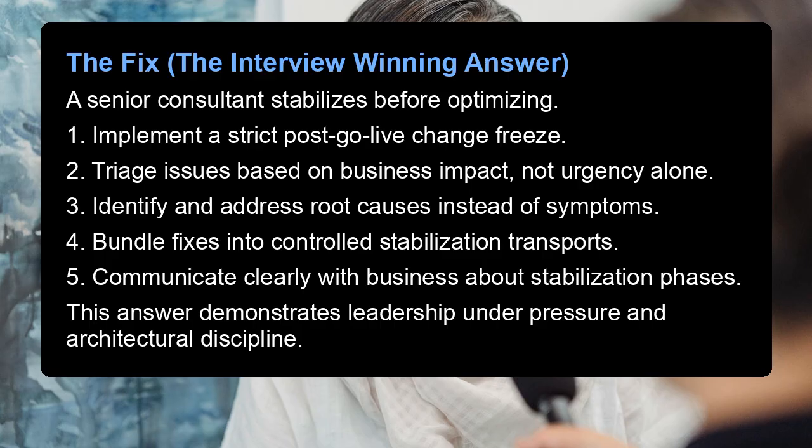The fix, the interview-winning answer. A senior consultant stabilizes before optimizing. 1. Implement a strict post-go-live change freeze. 2. Triage issues based on business impact, not urgency alone. 3. Identify and address root causes instead of symptoms. 4. Bundle fixes into controlled stabilization transports. 5. Communicate clearly with business about stabilization phases. This answer demonstrates leadership under pressure and architectural discipline.